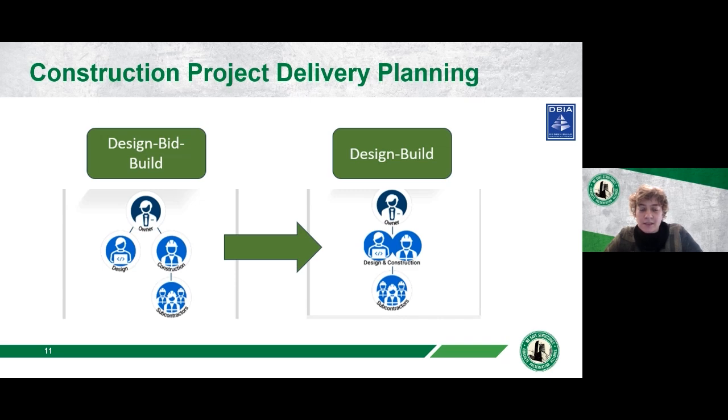From starting out, it's important to first establish, when we're talking project delivery, the model that most everyone's quite familiar with is design, bid, build. That's where we have the owner having separate contracts with their design team and their prime contractor. Then the prime contractor would have subcontracts with all of their sub-partners. This is conventionally procured based on lowest bid, for the qualified but lowest bid thereafter.